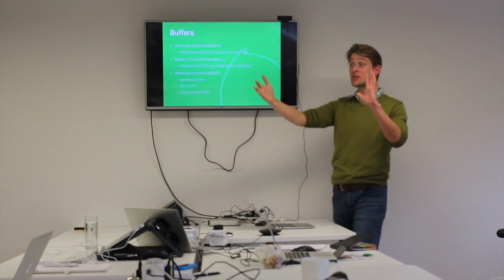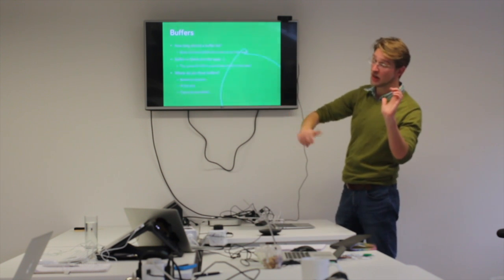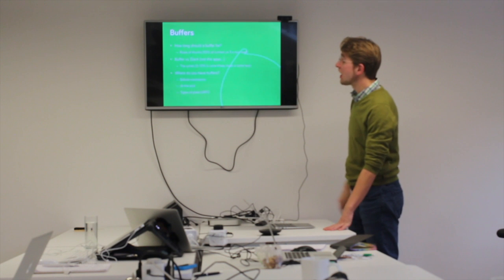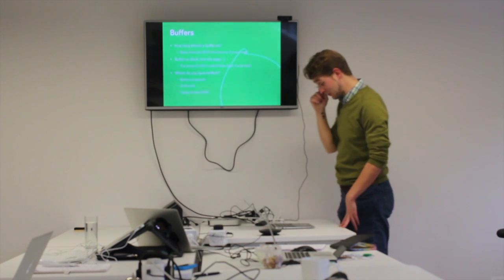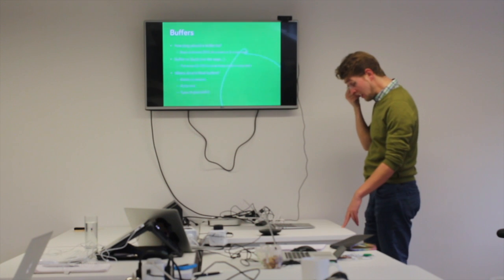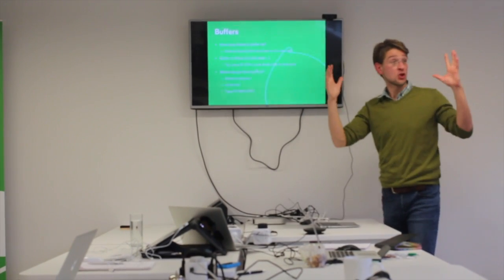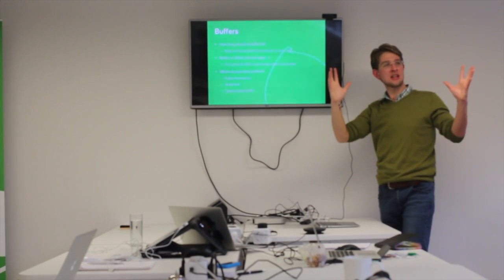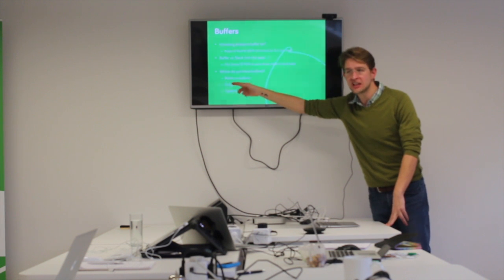Right, so we have this period of time that says, let's say it's 5 days from when work is released to when it arrives at the buffer. There is a difference between buffer and slack, which I like because they're actually both apps as well. So you want 90-95% of your work to deliver in those first two zones. And then the final zone, the red zone, is basically your slack.